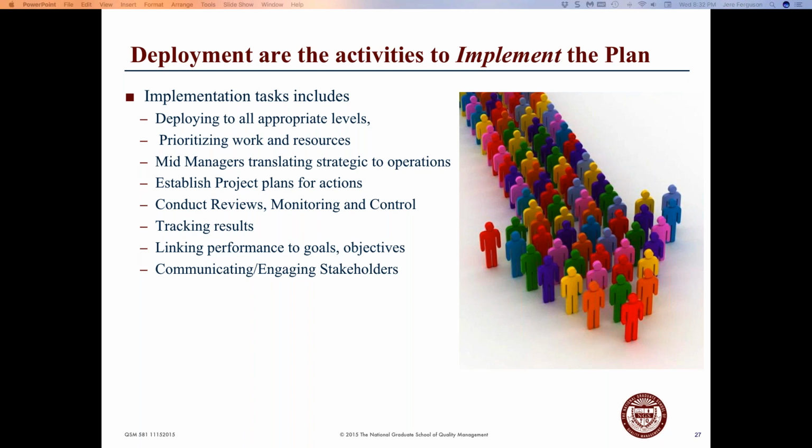While it shows up in PMI as a step in project management, it's really a continuous process that takes place throughout a project. And we review and monitor and control throughout the entire project. But it's important that we capitalize that and identify that in the implementation plan to show where it's taking place, where the touch points are.